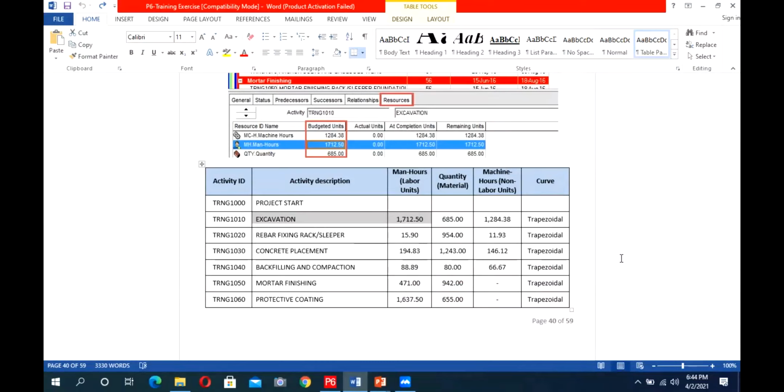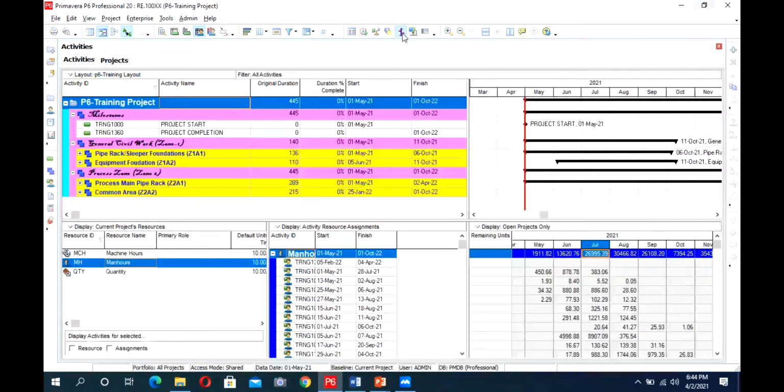Okay, basically you want to set an upper bar so that for 1 month it should not allocate more than this resource, and if it is exceeding, it should increase the duration. So basically, we discussed there is a leveling activity in P6. While doing the leveling, you can even assign from there what should be the maximum level of resources.